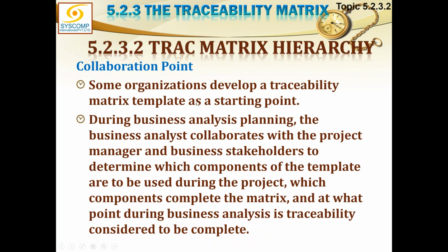Collaboration point here: some organizations develop a traceability matrix template as a starting point. That's a very good practice. We must have a traceability matrix template if it is usually used in our organization. During business analysis planning, the business analyst collaborates with the project manager and business stakeholders to determine which components of the template are to be used during the project, which components complete the matrix, and at what point during business analysis is traceability considered to be complete. So this must be defined explicitly by the business analyst when the requirements are being established.